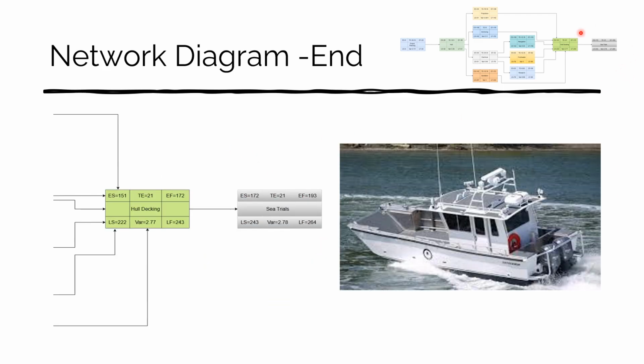Here we are at the end. This is again what we talked about where we separated the hull decking and the hull construction. We felt that each one of those activities was significant enough that we could separate them into their own activities and it wouldn't be excessive. We also felt it belonged at the end of the construction of the vessel because we want all of the systems in place before we put the deck down on top of it and it's ready for commercial use. We're ready to get some people on the vessel to use it.